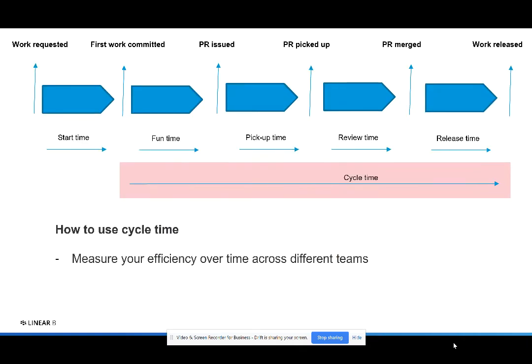So how do we use cycle time? If you look at cycle time over each of your teams and over each of your iterations, you'll start to get a sense for your efficiency and your trending over time. More importantly, by measuring each phase of cycle time, you'll identify bottlenecks in your delivery and ways that you can fix those.